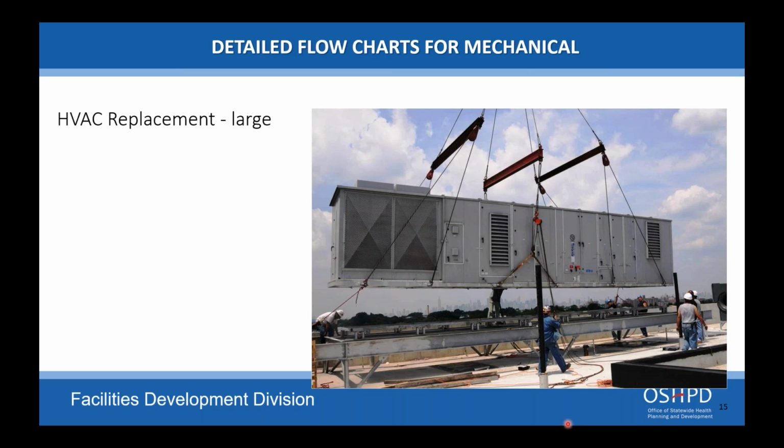You do not have to take anything downstream to the ducts, to the dampers, to the rooms, etc. And there are requirements that this would be comparable to the unit being removed. If you have specific questions on that, you can contact us, but we're going to be looking at the CFM capacity, the tons, all that, the weight of the unit itself to make sure that it will work with the same support structure.